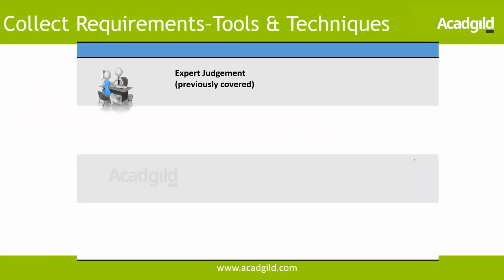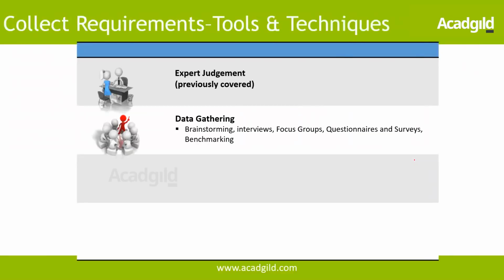So tools and techniques. One is expert judgment, again talking to experts, trying to understand, given the high level definition of the project, what the requirements could be. Data gathering. So these are some of the techniques like brainstorming, interviews, focus groups, questionnaires and surveys, benchmarking.